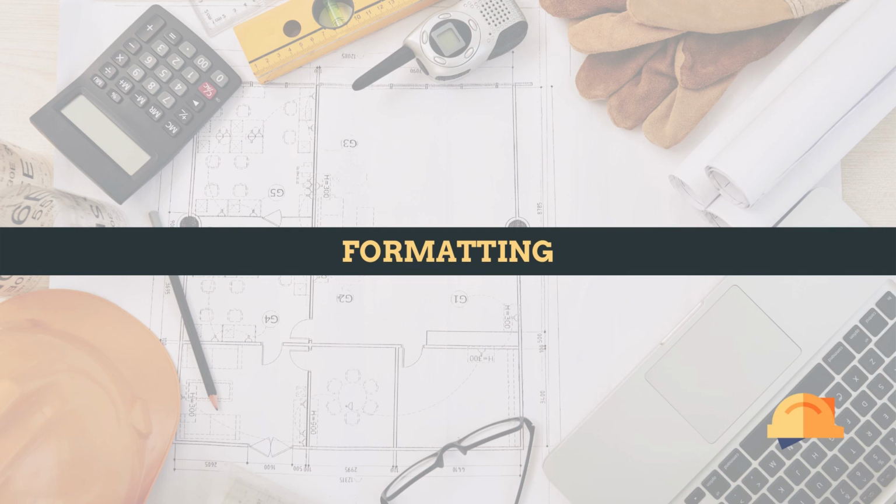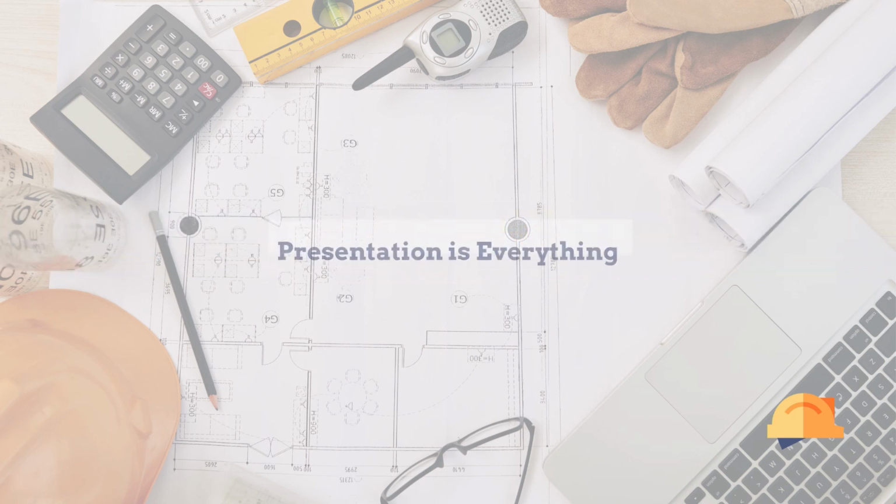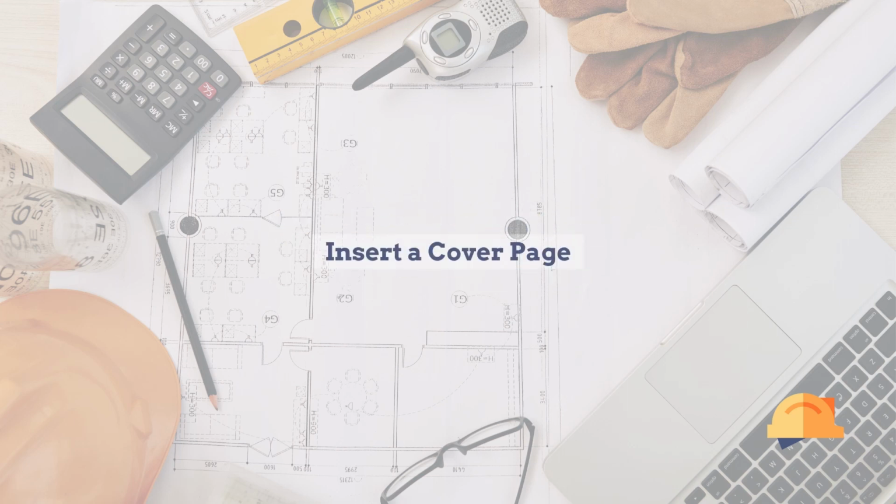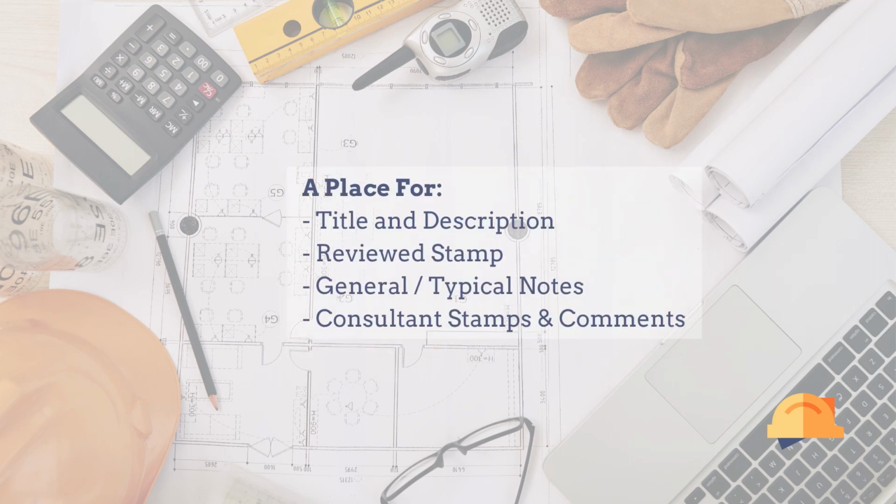Number 3. Formatting. Make sure your submittals present well and keep their appearance consistent, starting with inserting a cover page. This page serves a few purposes. First, it's a place to add a title and description of the submittal, as well as a place for your stamp and any general or typical notes you have for the submittal. And finally, it's a place for other reviewers to add their respective stamps and general comments.